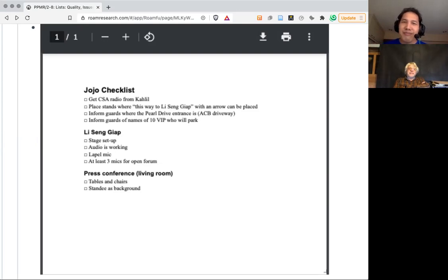I think the checklist is the visible part of the process, but behind the checklist, it's assumed that you know how qualified the people are to do the job, and so you shrink or extend the checklist depending on their expertise and supporting documents.